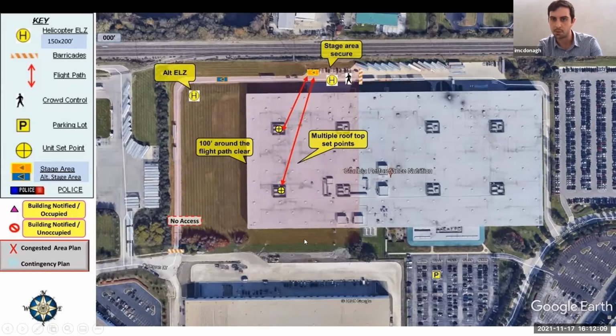So this ground was determined to be unsuitable to place a crane on in the wintertime with how wet it was outside. And then also the pick distance was limited. So for the size of crane we could get, we still would have had to drop it on the roof, probably right around here. And then we would have spent time on a gantry, dragging it to its exact location, lifting it and placing it onto the roof curb adapter. So the $8,000 was significantly cheaper than the week to week and a half we were going to spend craning all these up and then dragging them and dropping them into place. Surprisingly enough, I bet none of you probably thought it's cheaper to use a helicopter than it is a crane, but depending on the scenario you're in, it could be suitable.